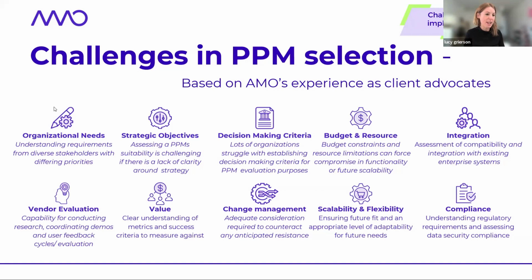The other thing that we think is really important in PPM pre-selection is the integration points that you need in your organization. The one that I would really call out is the finance system. Usually a key integration point for any PPM, if you want to avoid any manual load on your project managers, is an integration with your finance system.